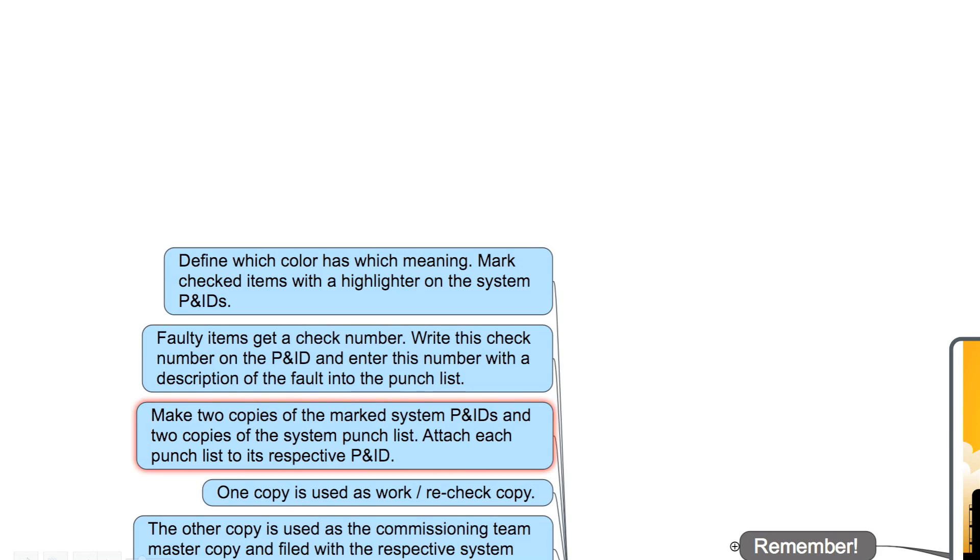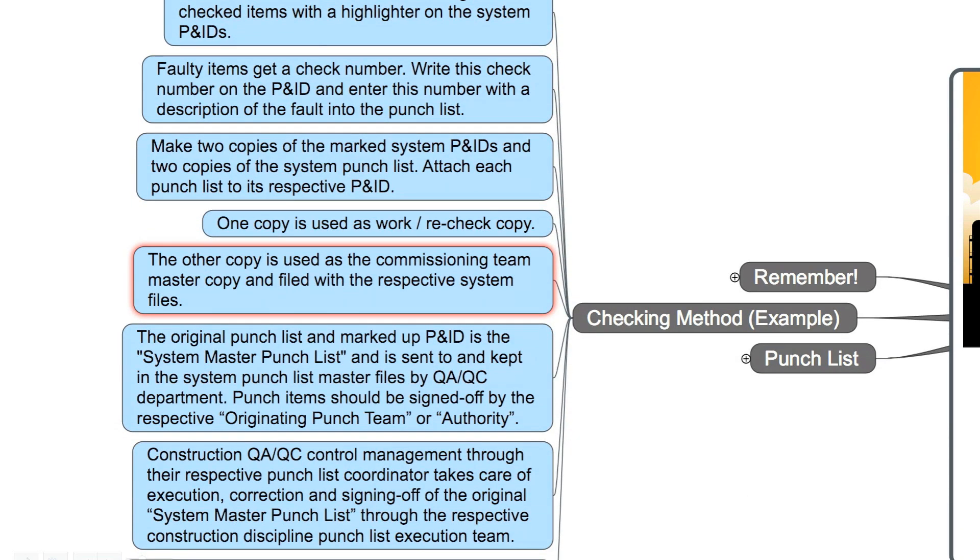Make two copies of the marked system P&IDs and two copies of the system punch list. Attach each punch list to its respective P&ID. One copy is used as a work or recheck copy. The other copy is used as a commissioning team master copy and filed with the respective system files.